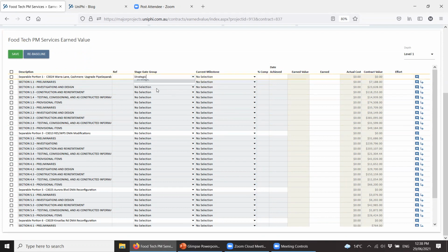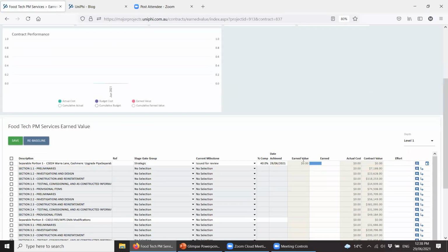You need to put in a milestone grouping for each deliverable. You'll have your own structure there for how you're going to validate that this deliverable was done. And every time you go through that, it will get an earned value for doing that particular piece of work. So it's 40% complete. There isn't any here because it didn't have any contract value. Do it on this one.